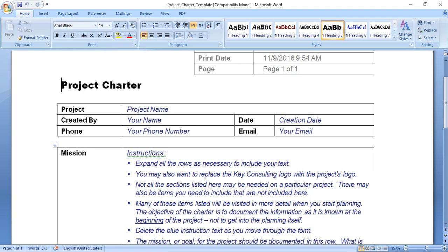Third thing we have to know, is this an enterprise project? If this project will impact 3 or more departments, then it is considered to be enterprise in scope. Special project selection and oversight provisions may apply.